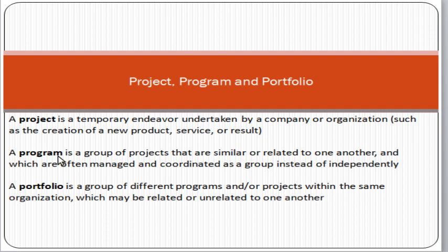So these three buildings, like dental, gynae and another building, every building is a project, because these three buildings are interlinked with each other. Their resources will be shared, the funds will be shared, the objective is the same. So that is why we say that it's a program. We are implementing a group of three projects, which are interlinked, with shared resources, shared main objective and aim, and shared funds. Program is a group of projects which are interlinked with each other and have the same objective and aim for the implementation. Okay, so this is the main concept of a program.